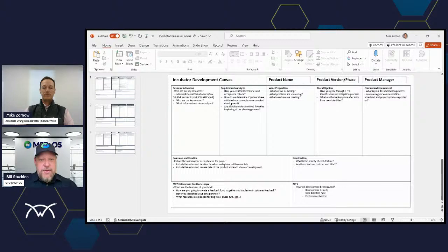Weekly for sure in the beginning. I would typically recommend that those stay weekly until your MVP is out. Then you can pull back, right? Because then you have the foundation and you've gotten through a lot of the potential technical issues. You have something that's functional, something that people are using, something that you should be gathering feedback from. Maybe some of the stakeholders don't participate anymore, but early on, it is critical for all of the business units to really understand where this is coming from.